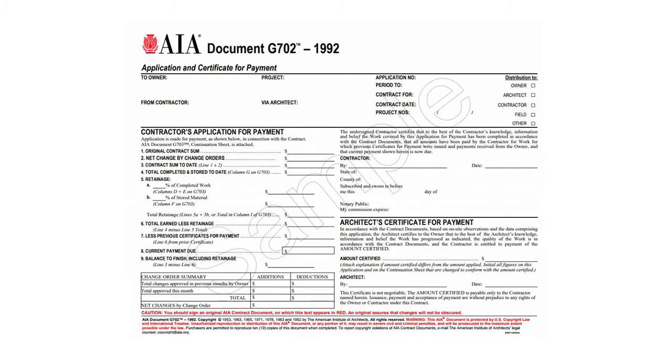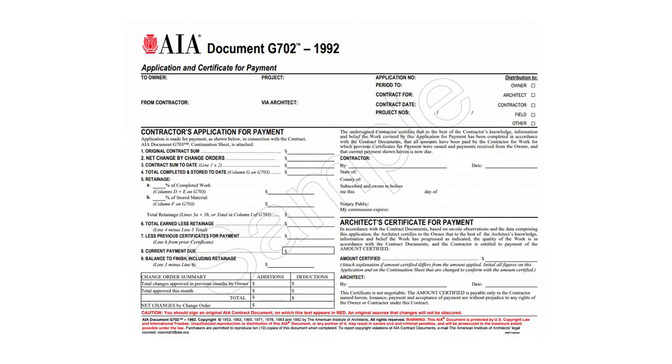So quite frankly, yeah, in summary, basically all the subcontractors will make statements. Again, generally speaking, they're making a statement on a specific AIA form that says, here's the work we've completed, and this is what we've done. Since the last draw, since their last payment, yeah. Since their last payment. So the period of a month has gone by, more or less, and this is what we want to get paid. The general contractor or the construction manager will aggregate those into one large pay application, and then that gets reviewed by the whole team. They also use the same forms that the subcontractors use, which is typically an AIA G702 and G703, and that summarizes everything.